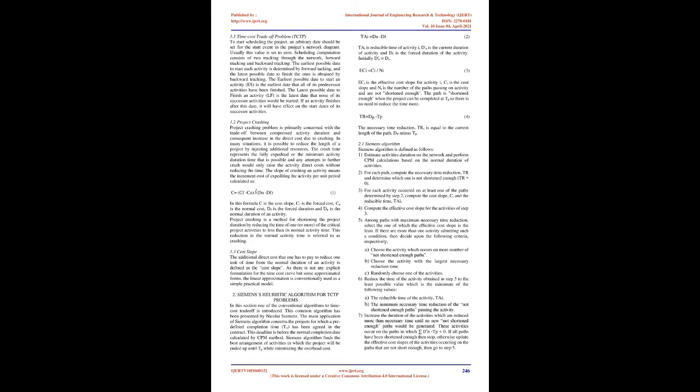FIG 1 illustrates the basic relationships between indirect, direct, and total project cost due to crashing. The paper is organized as follows: in the next section we briefly define the deterministic time-cost trade-off problem, then relevant research and performance is carried out manually with an empirical example, and the CPM of the related example is found using Oracle Primavera P6. To start scheduling the project, an arbitrary date should be set for the start event in the project's network diagram, usually set to zero. Scheduling computation consists of two passes through the network: forward tracking and backward tracking. The earliest possible date to start each activity is determined by forward tracking, and the latest possible date to finish is obtained by backward tracking.